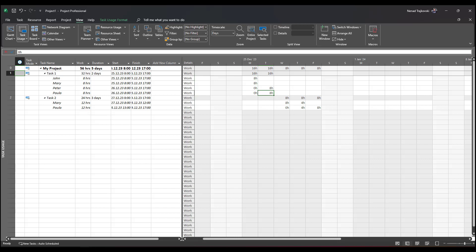For task two, which is three days, 50% means Mary worked one and a half days. She should work on task two on day one and half of day two. Paula is not going to work on the first day, but only the second half of the second day and the whole third day.